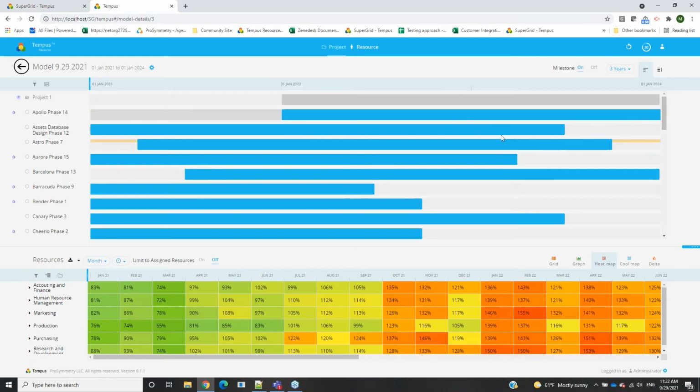And you'll have essentially 3 options you can do within here. One is if you click on the bar, you can move it to the left or right, and that's going to simulate a change in a project's start and end date. So what if you have a project or a handful of projects that need to be moved out 6 months? You could find this project.